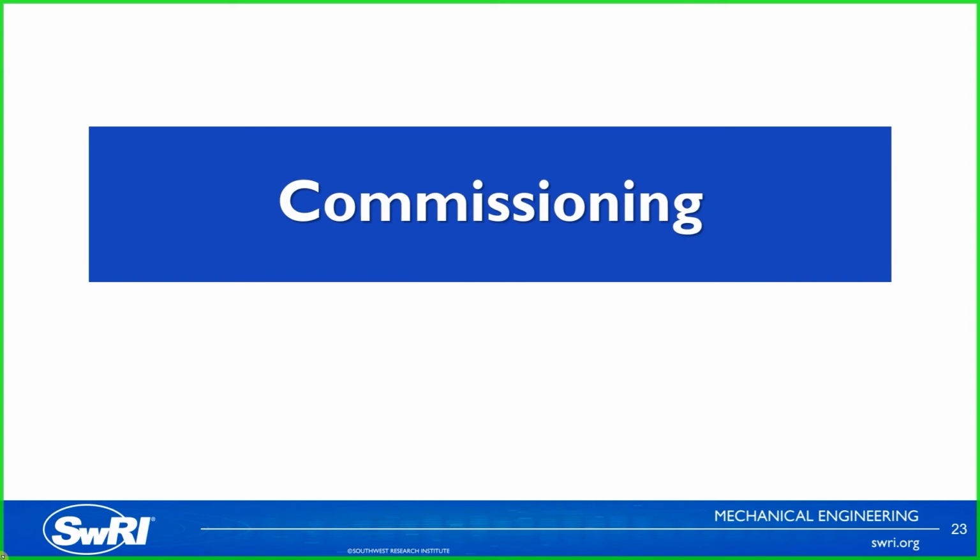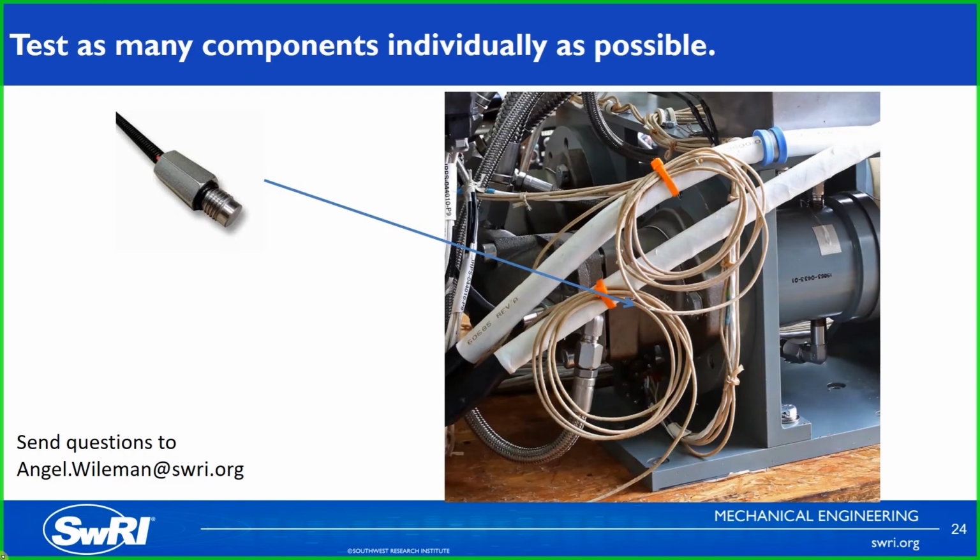So moving on to commissioning, again, we kind of describe commissioning as the testing procedure of showing that the prototype does what you think it does. And so my first recommendation for commissioning is test as many components individually as possible.